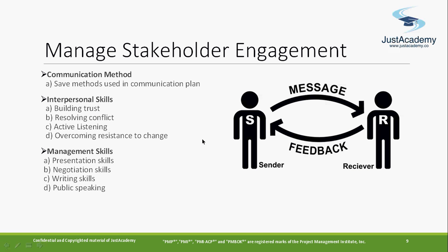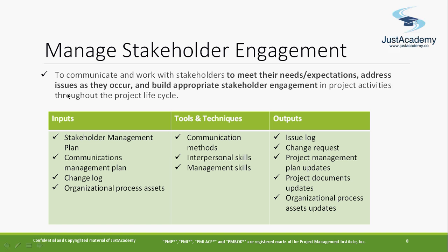Communication method, if you remember, we talked about it. What are the different communication methods? Interactive, push and pull communication. So you can use those techniques for engaging with them, like having an interactive session, or maybe just sending a mail to them, or maybe you can update the status so everybody can come and see that. So you can use different tools and techniques based on the stakeholder.